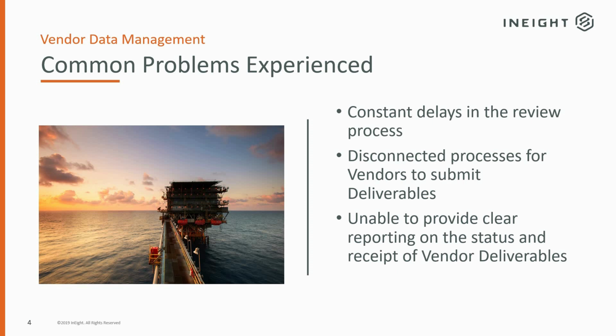The problem that a lot of companies face when managing vendor deliverables without a system in place is that it is a very labor-intensive task to manually keep this information up to date, and obviously that has its own inherent problems. Constantly we find that there are delays when companies are reviewing documents, and that hard copies of documents are being lost on desks or being pushed aside for more critical work. And there's no way to properly track this without a proper system. Having vendors submit deliverables in any number of ways makes it really difficult to track the actual received date of those deliverables and have clear reporting on the current status of each of those items that we're expected to receive.